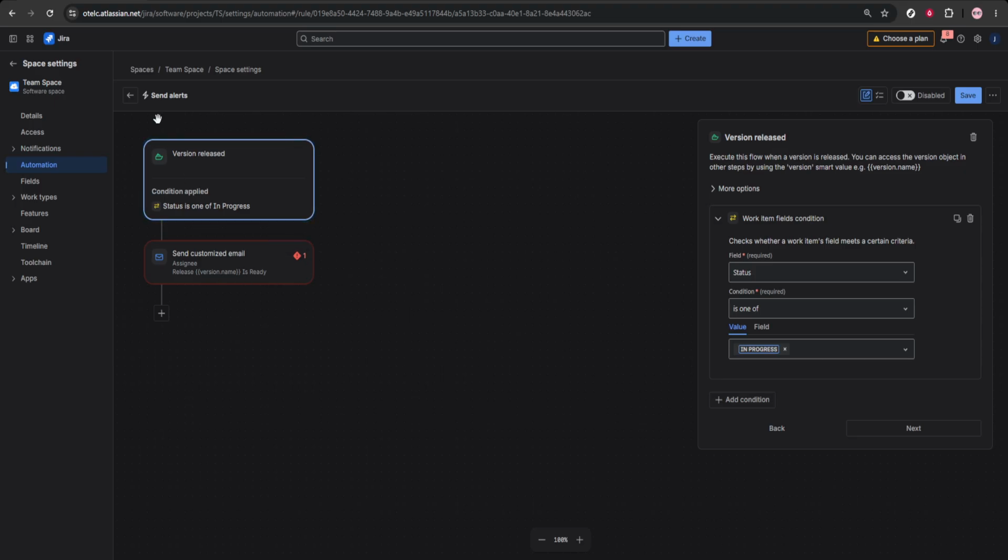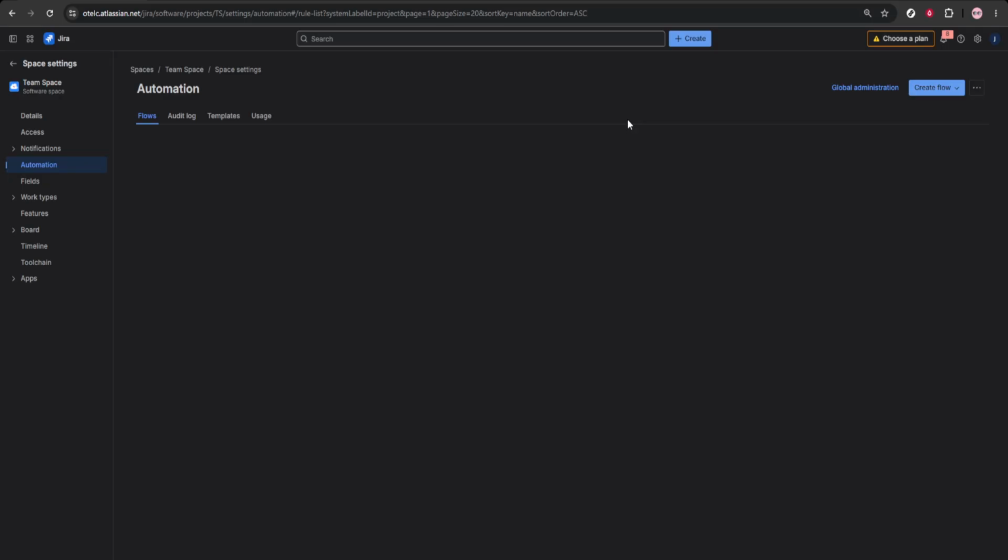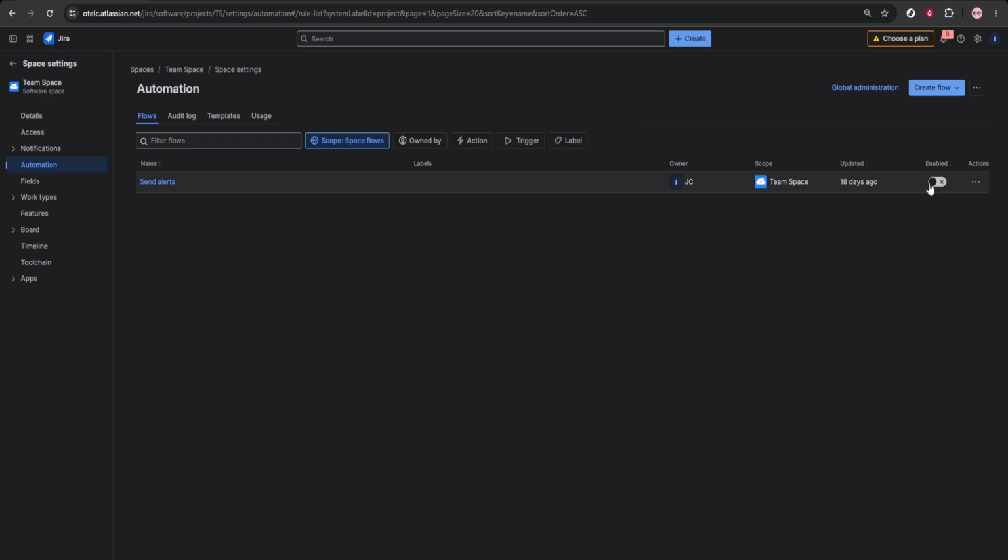Then move on to the rule scope. Open the automation rule settings and check where the rule applies. Make sure the scope includes the correct project, the correct issues, and the correct users. If the rule is limited to a different project or a narrower set of issues than expected, it may look like the automation is broken when it's really just not allowed to run in that context.